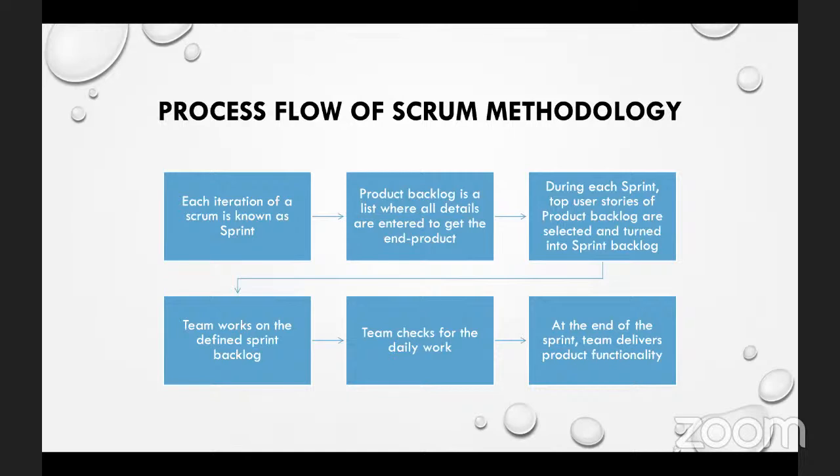So the owner of the platform will share all this list of items that they want on their platform. This is what we call the backlog. So in the backlog, you will be writing user stories. You'll be putting all these things out there, and it will be growing. It's going to be a tall list, and that is what we call product backlog, right?